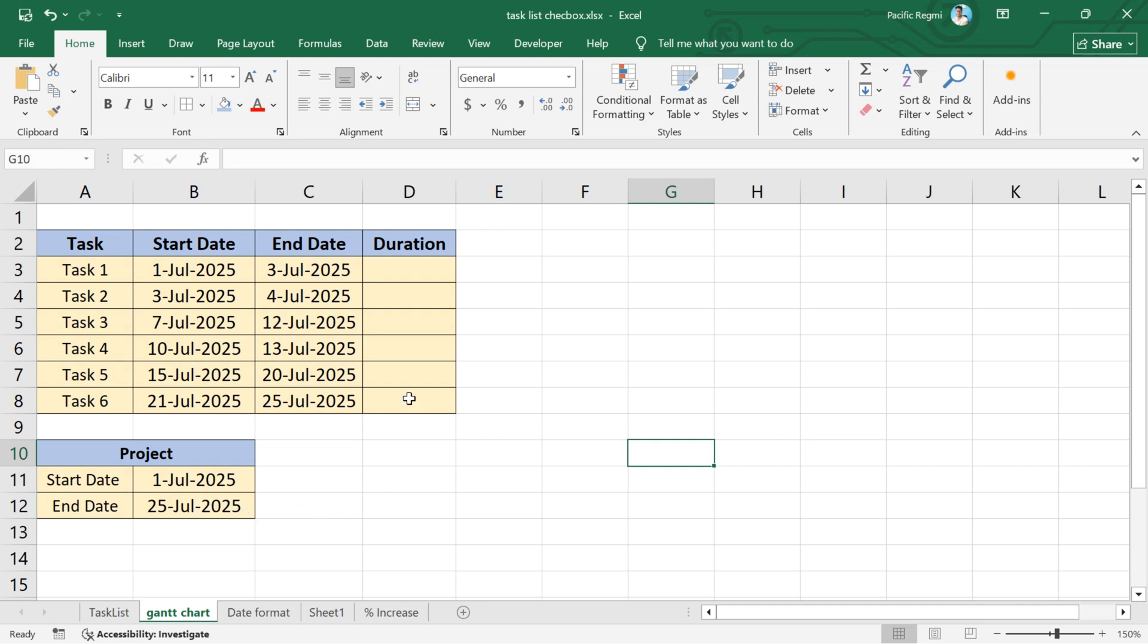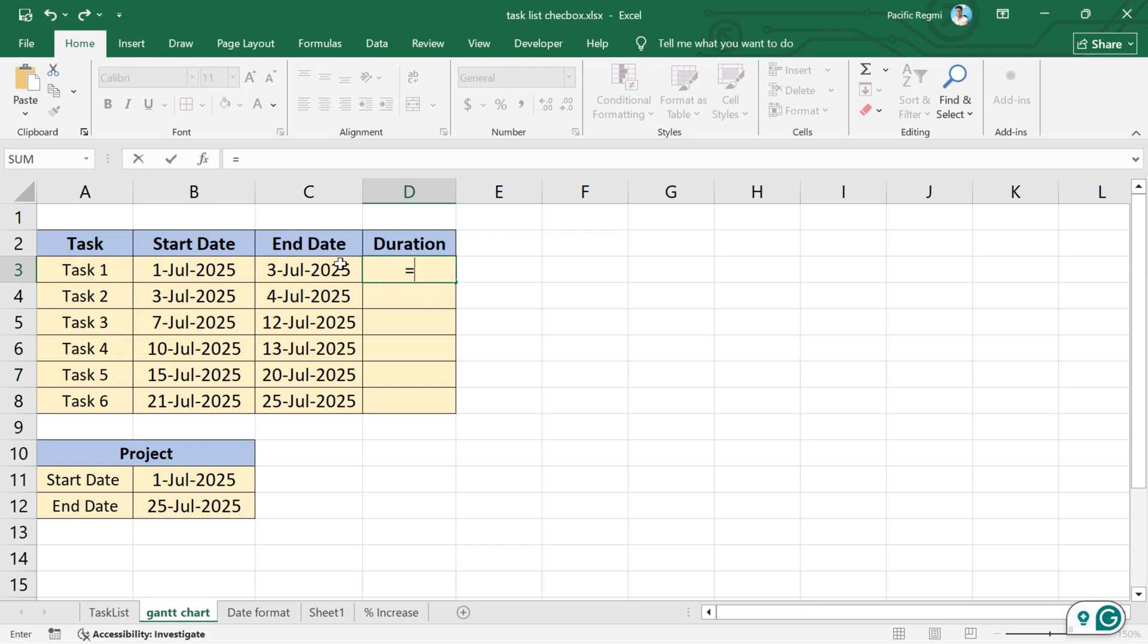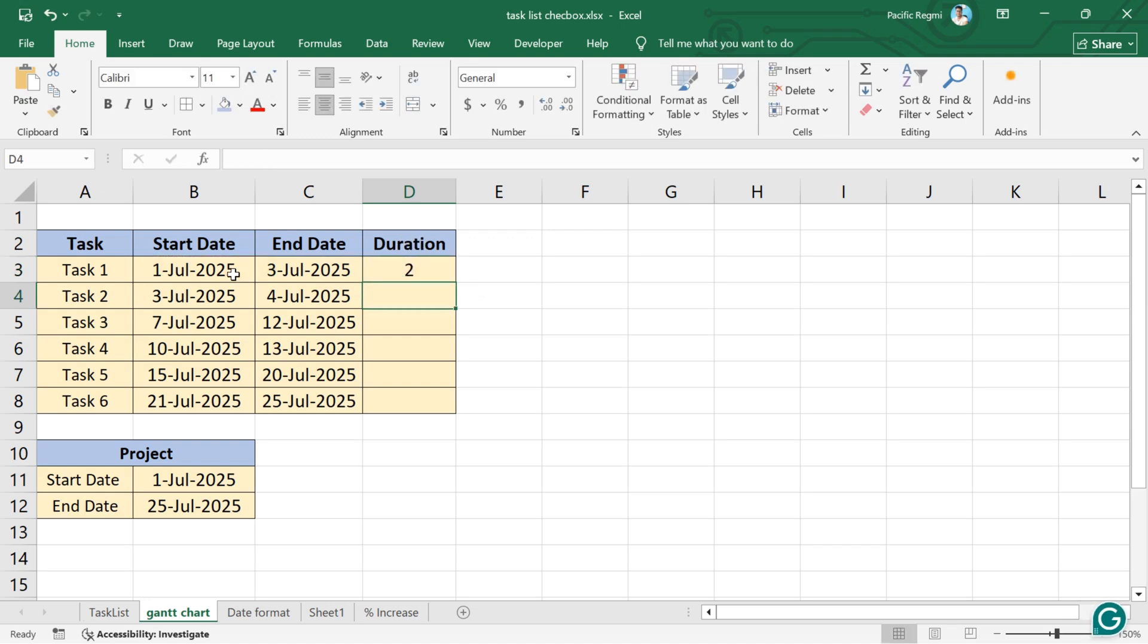Now, click on the first cell under the duration column for task 1. This is where we will calculate the number of days each task will take. In this cell, type the formula equals C2 minus B2 and press the enter key on your keyboard.